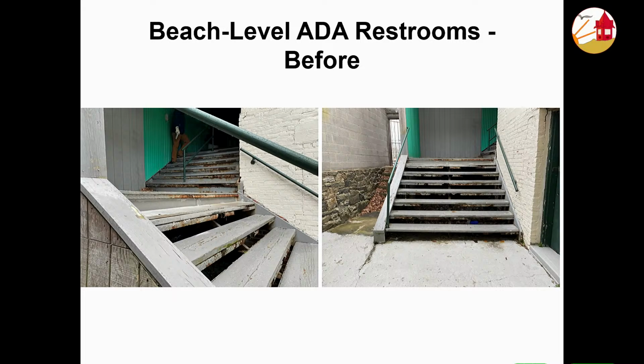Part and parcel with that is the change order in front of you tonight for electrical work. When we went to install that steel to support that floor, there were numerous old conduits that were run willy-nilly. There's a photograph in the package that I gave to the board. The junction boxes were rotted out. The conduits were rotted.